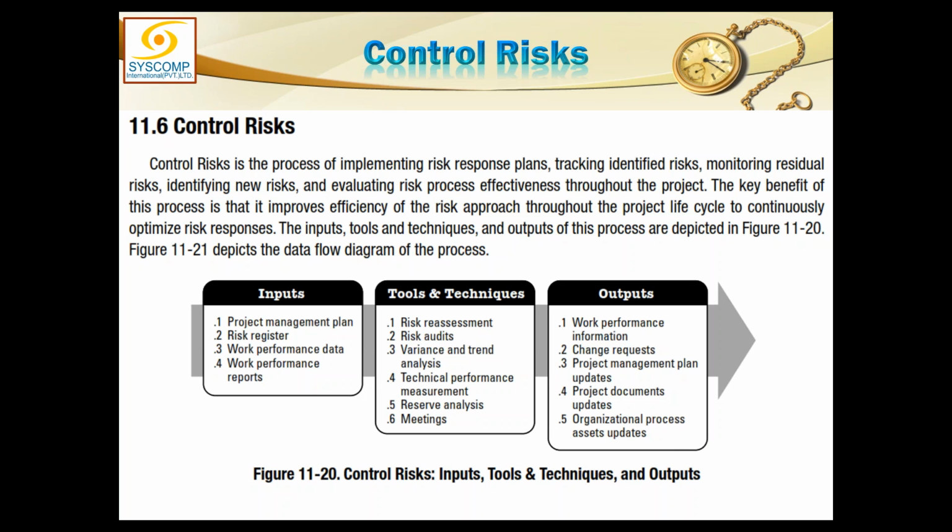And if the residual risk is within our tolerance, we will not take any further action. We will just keep it on the watch list. But if the residual risk is more, then we probably have to identify some other strategy. We will reanalyze the remaining risk, and we will develop another risk response plan.